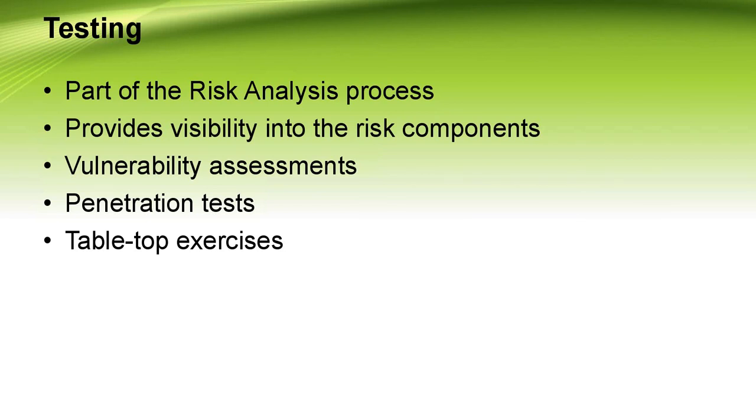In any case, the risk assessment process must consider the potential impact and should require authorization prior to conducting such a test. This authorization should clearly provide an overview of the purpose, specifying the possibility that this could cause system disruptions. In addition, the authorization should provide enough details about the testing.